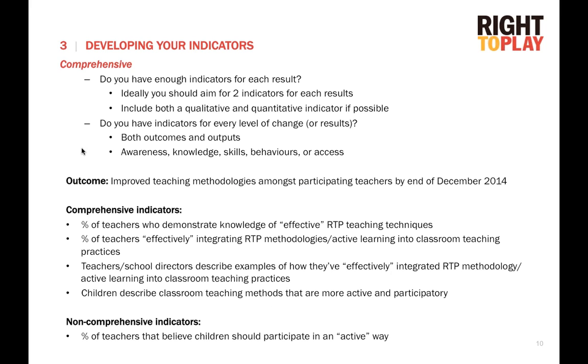I just want to make another note about some of these indicators. Once again, I'm using the word effective, and I've put it in quotation marks. And when you use a word like effective, similar to what I just mentioned about using words like improve, you really want to define what you mean by effective teaching techniques. What do they need to be doing? What do they need to know? You really want to define it. And it's good if you write these sorts of things down and include them on your PMF, because anyone should be able to take a look at your indicators and have a good understanding of what needs to be done and what information needs to be collected.